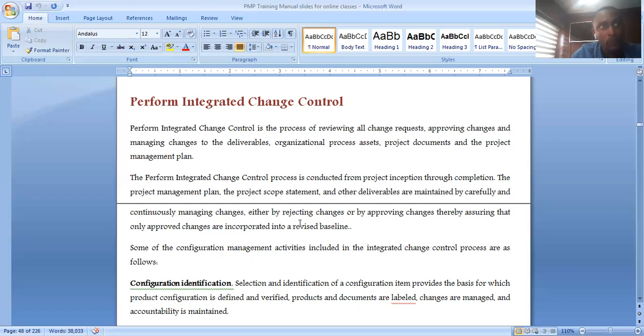Now, what to probe? You have to come up with a checklist on how to probe an architectural plan, and you have it documented somewhere in your knowledge repository. Your architect may not be aware that you have such a document somewhere. Once it's done, you bring it out. It's not there. You have looked at it.